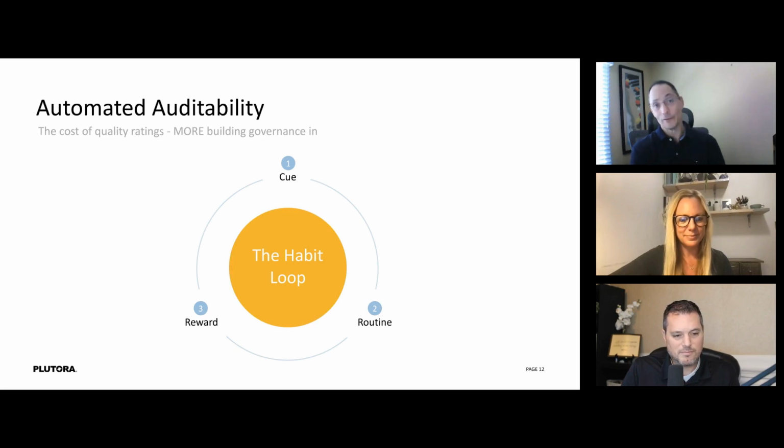From one perspective, Helen, bigger can be better because it means you're delivering more, right? But that's a different angle on it. Some of it is just being able to see what bigger means. So how do you quantify bigger? With the data that I have, I'm able to tell the difference between somebody that's delivering 2 stories and somebody that's delivering 1,000 stories or hundreds of stories. While that's not 100% a black and white answer, it does tell you something. When you can see the more work that's going into a release, you can see the complexity going up, and with complexity is always going to come more risk.